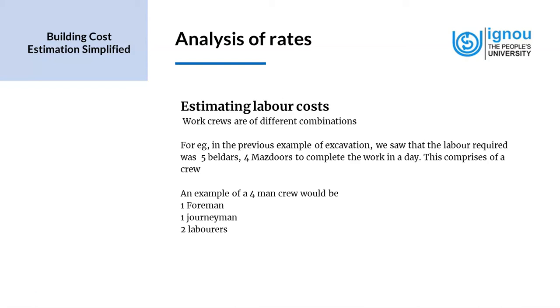The composition of the crew also impacts the cost. For example, it may be more profitable to have 1 mason with multiple laborers than to have multiple masons, and this would be especially relevant in work that involves heavy hauling or moving of heavy objects.